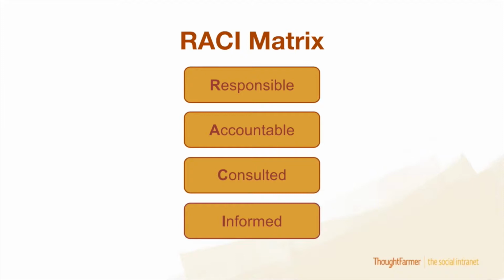The accountable role, this is the person who is accountable for the task at hand. It's usually one person, and it's often the Intranet business owner or the project sponsor. This is the role that is accountable for the work and that approves the work that is being done.